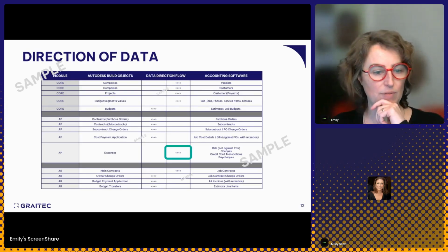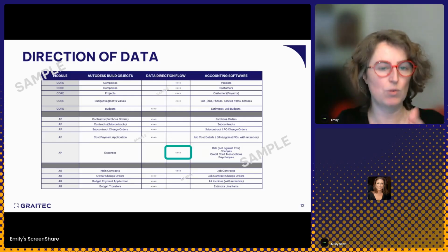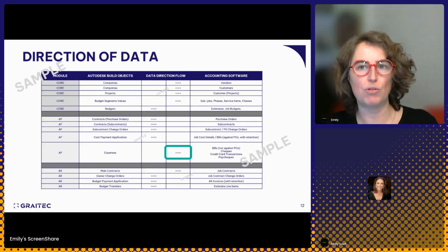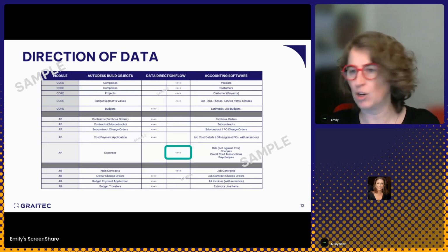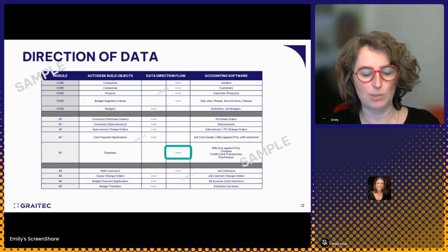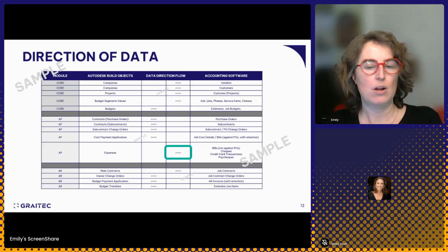Each budget item can be forecasted out across the length of the project, and as you're working through, let's say you've come through a few months of actual costs against several budget items, and you realize that you're spending more or less than what you had originally forecasted.